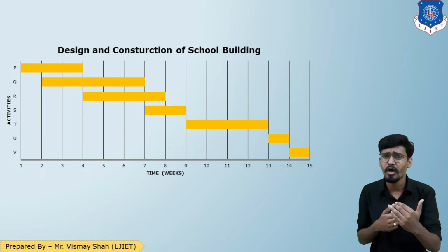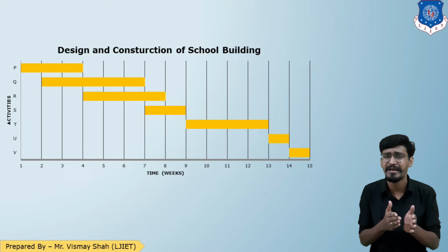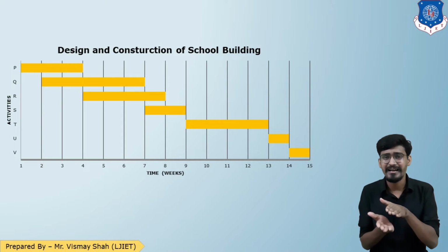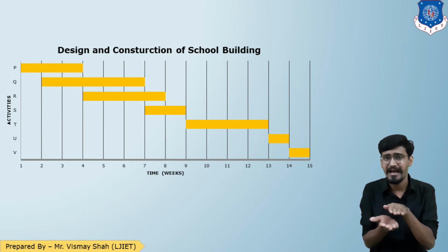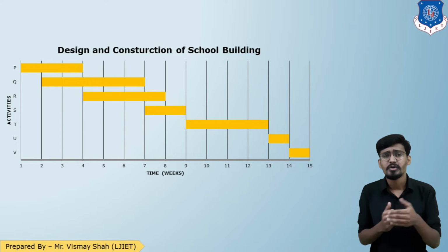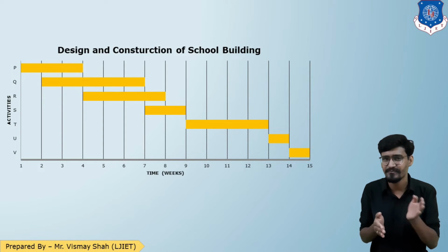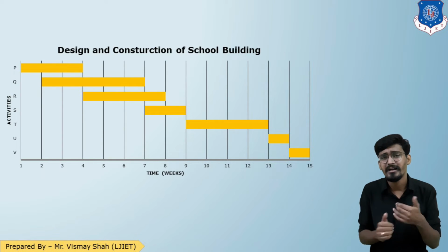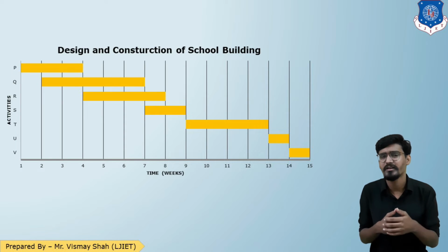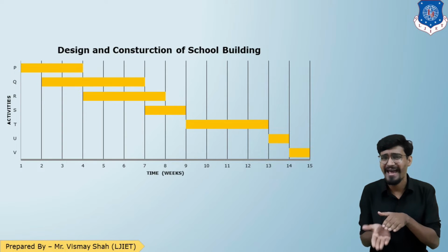When the survey is ongoing and a certain part of it is completed, the architectural and structural firms start their designs. So there are two activities which run partly in parallel. Then there is the preparation of drawings. Once the architectural and structural designs are finalized for a certain portion, the draftsman starts drafting the drawings. That is also shown parallel to it.